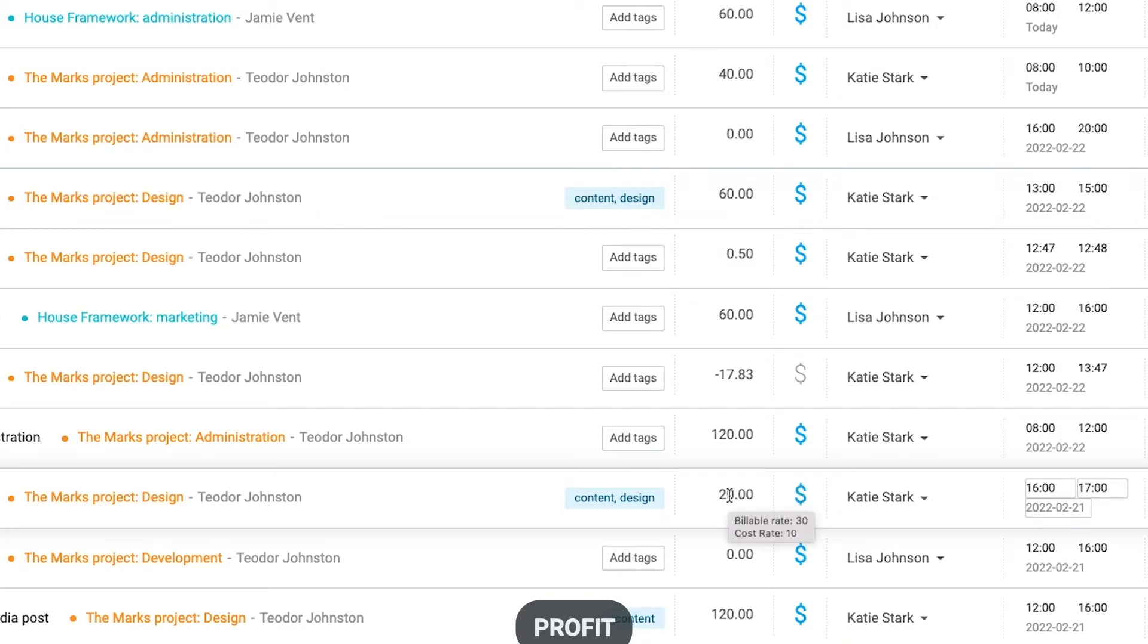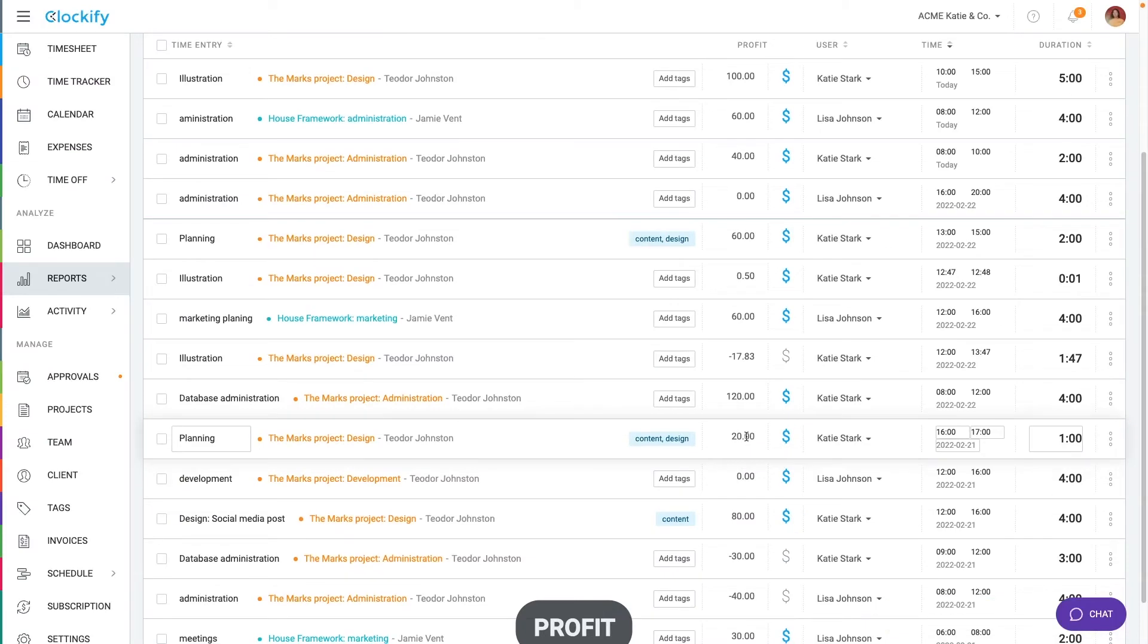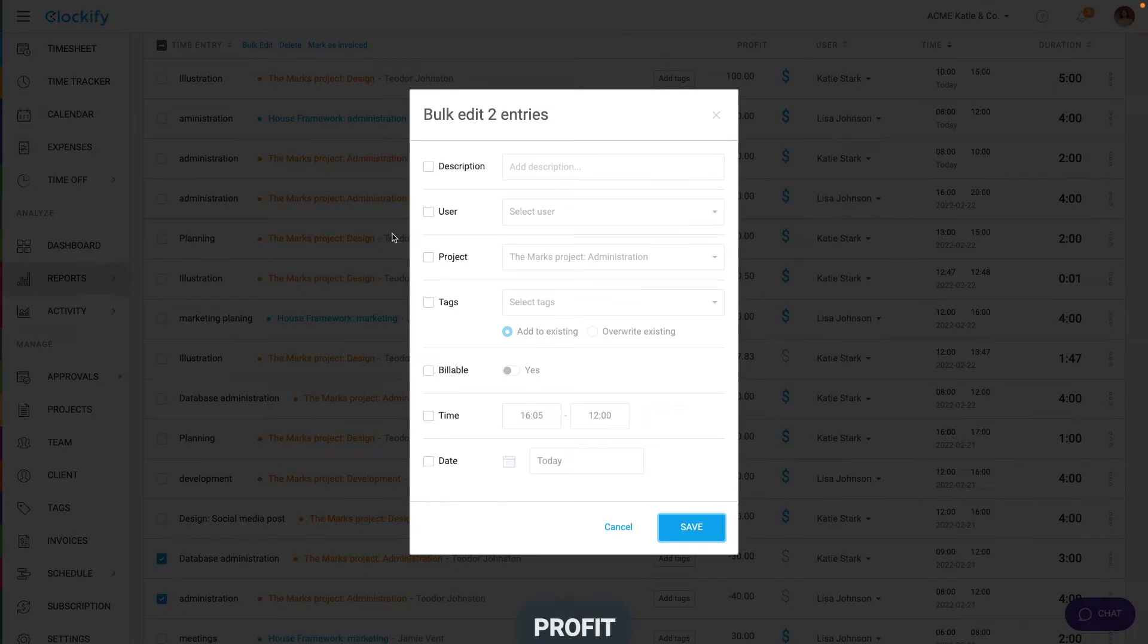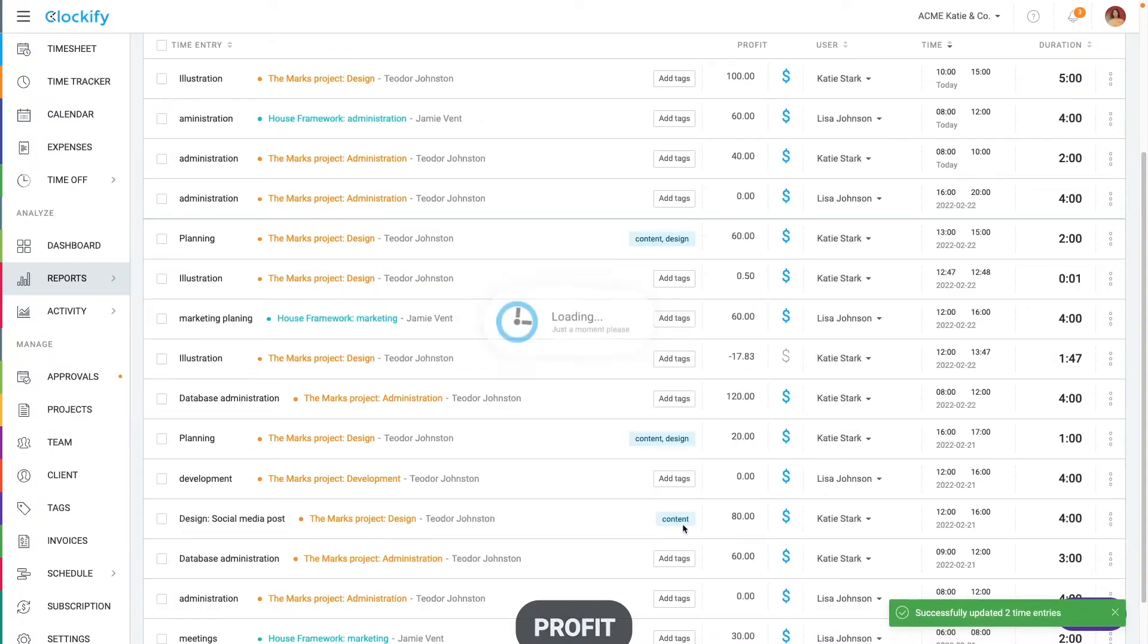If you wish to apply the new rate to multiple entries, you can select them via bulk edit in detailed report and change their billable status so they all pick up the new rate.